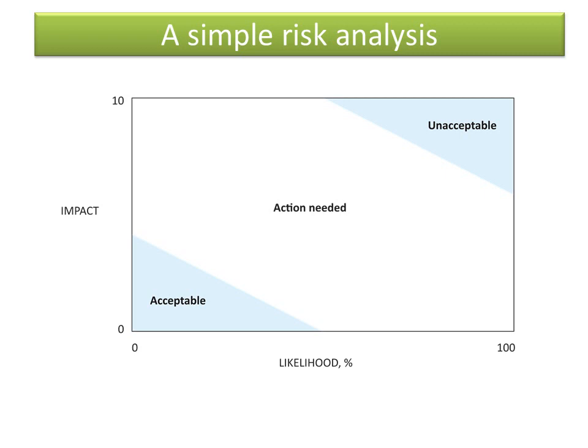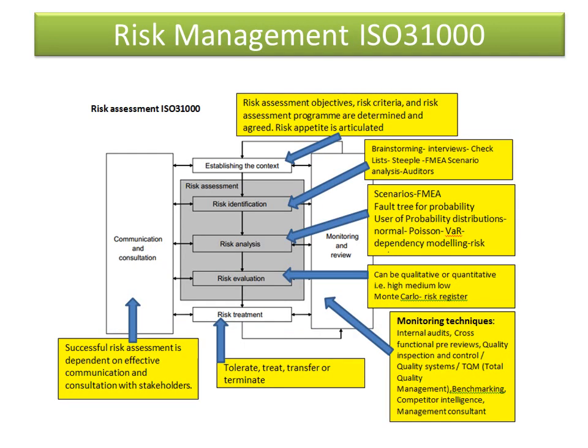Often organisations will use red, amber, green, and there will be quadrants in this risk analysis, or they'll use a risk register. But visually, the impact likelihood matrix is useful to give us a view on what actions we may take after assessing. Here is one of a slide that I've produced from the risk management, and it sums up the key ISO 31000 process, that risk assessment is about identifying the risk, analysing the risk, evaluating the risk, and then treating it with tolerate, treat, transfer or terminate.